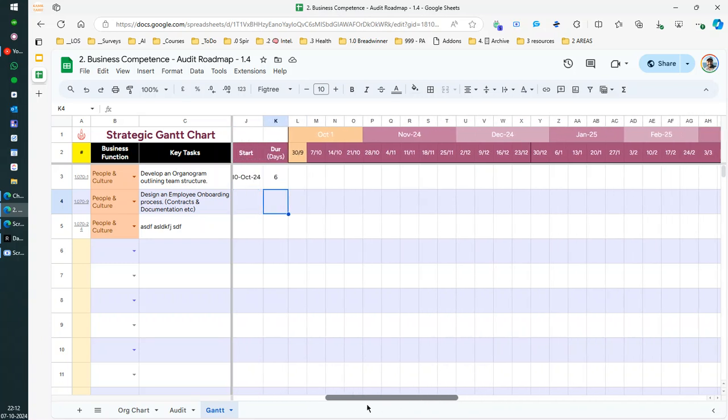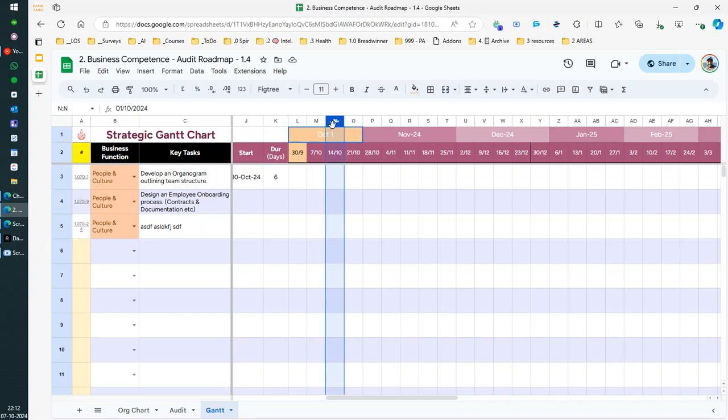The next task is that we have to see which are the dates that we are planning it to start. We say, okay, this is where October is starting. Today's the 7th, for example. We say this cannot be done until next week. And 6 working days. It means that one column represents 1 week. So we consider that this could be done in this week and another week. It takes 6 days, but it might have some spillover or some extra tasks, or we need to have some buffer time anyways.